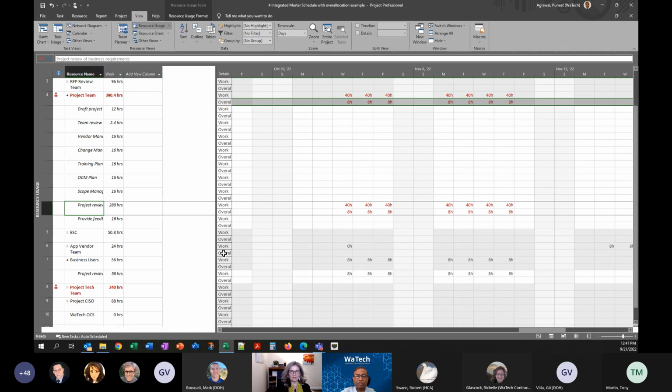So now as a project manager, I know I have a shortfall of 8 hours. What do I do next, right? That's the decision I need to make based on the options available. Is there a way I can get one more resource? What if I reduce the allocation to 32 hours and extend this task by 3 days? What is the downstream impact? Can I absorb that delay? Can I get a new resource? So these are the options that you would think through.